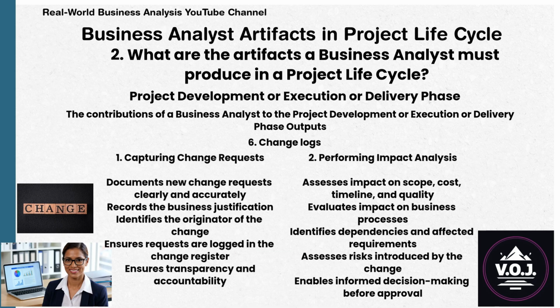The contribution of a business analyst to the sixth output, which is change logs, are: 1. Capturing change requests. The BA documents new change requests clearly and accurately, records the business justification, identifies the originator of the change, ensures requests are logged in the change register, and ensures transparency and accountability.